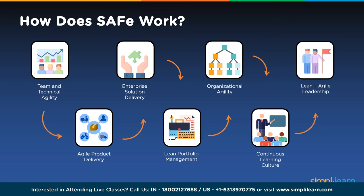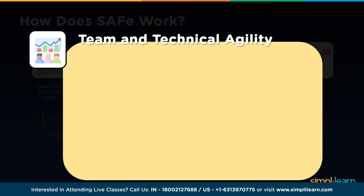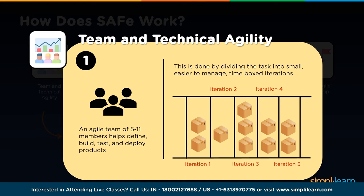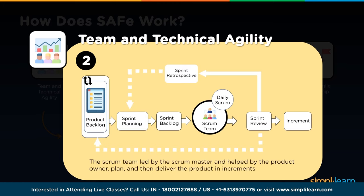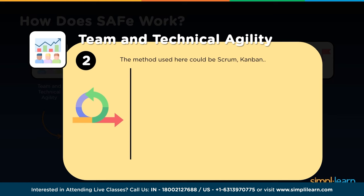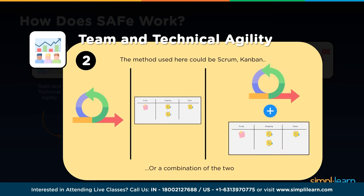How does SAFe work using these competencies? Team and technical agility involves an agile team of 5 to 11 members that helps define, build, test, and deploy products by dividing tasks into small, time-boxed iterations. A scrum team led by the scrum master and supported by the product owner plans and delivers the product in increments. After delivery, they hold a retrospective to determine how iterations went and how to improve, incorporating learnings into the next iteration's planning. The method used can be scrum, kanban, or a combination.